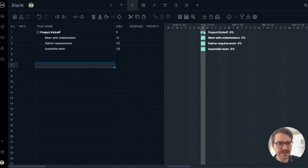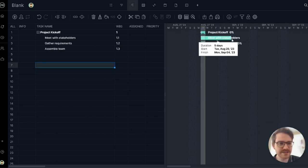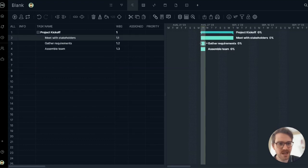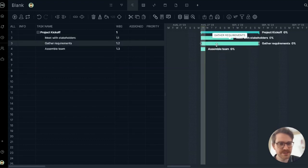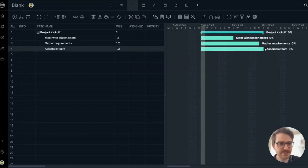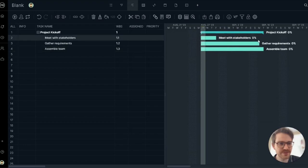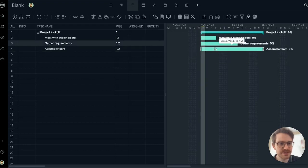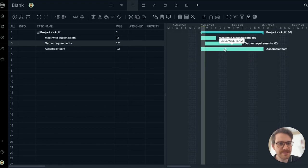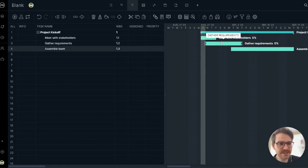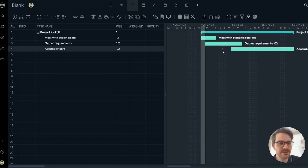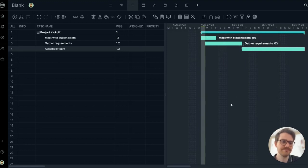So to get that classic waterfall structure, let's adjust the dates. I'm just going to simply drag and drop some of these tasks to stretch them out a little bit. Maybe that one's a little too far. Let's be a little more reasonable. They're not all going to start on the same day, so let's stretch them out. And if I want to establish any dependencies, all I have to do is simply drag and drop the tasks to connect them.